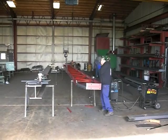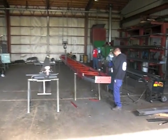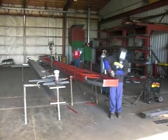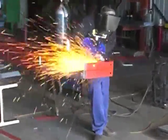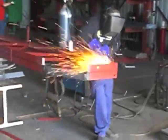And what's nice there is, we have already sent out a lot of the foundation information, so there's site work going on almost immediately. By the time the fabricated building makes it to the job site, they're ready to go up with it. So not only is the building efficient in what it is, but the erecting process is also very efficient with the K building.